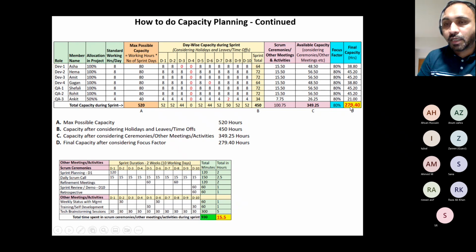Again, there are no right or wrong answers. If you are doing sprint planning for the first time, let's put in a baseline. For example, you might be asking, what if you are running sprint planning for the first time? Then get it documented: since we are doing this for the first time, we don't have any historical data, so we're going to go with 8 points per person per sprint, or 13 points, whatever gets the agreement.